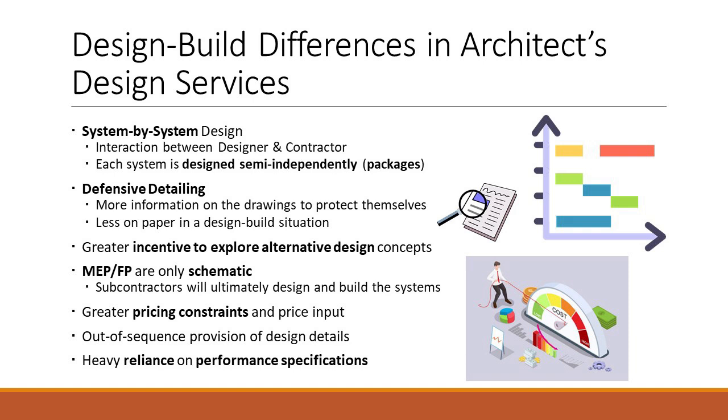The other thing here is because the contractor and the architect are working hand in glove in this design-build entity, the contractor can be more free about it. Say, that truss system you have is fine. We have to have this big span to cover so we can't have columns in the middle of this huge room. And I see that you have this truss system, but maybe you could think about it differently this way. Let's try this alternate design, sometimes called value engineering. And that could, again, reduce cost, create speed, so there's more incentive to do that.